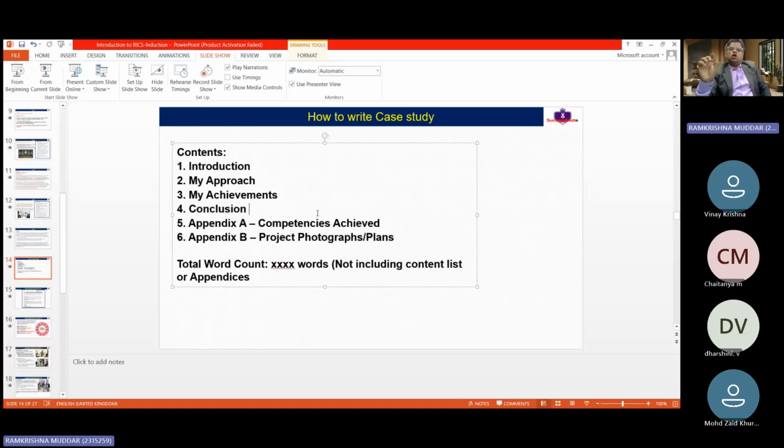Option two is you negotiate the rate with the existing contractor. You call him on the round table and you tell him, okay, if you are increasing the rate by 50 dirham, 100 dirham, at the end it is affecting us by 20 million. So it's not 100 dirham. Let's go for 15 million. It's a win-win situation. Still, if he is not agreeing, then this is option two, negotiating the rate with the contractor.